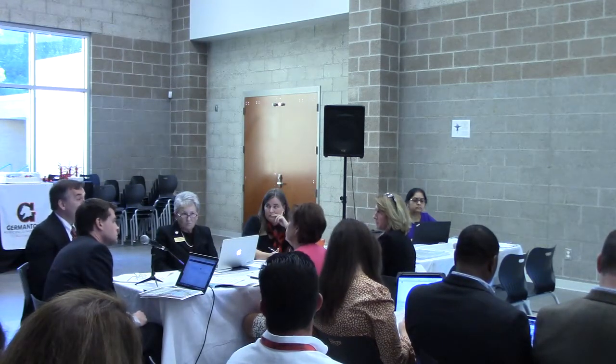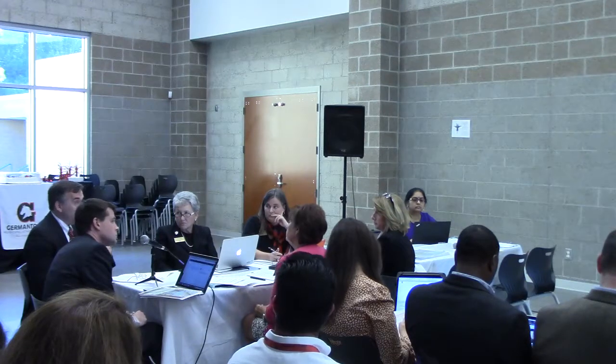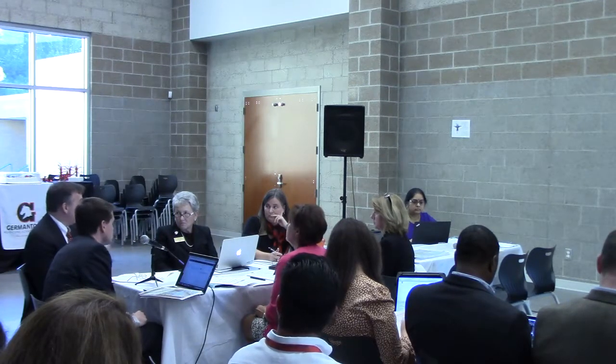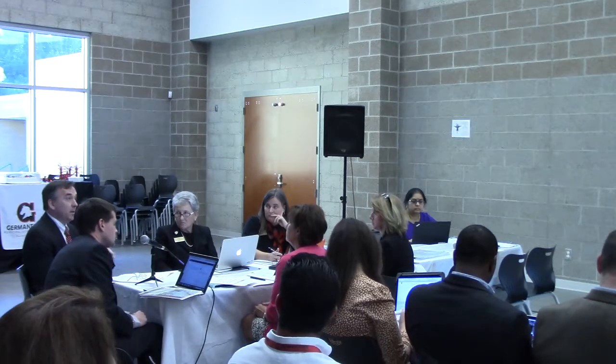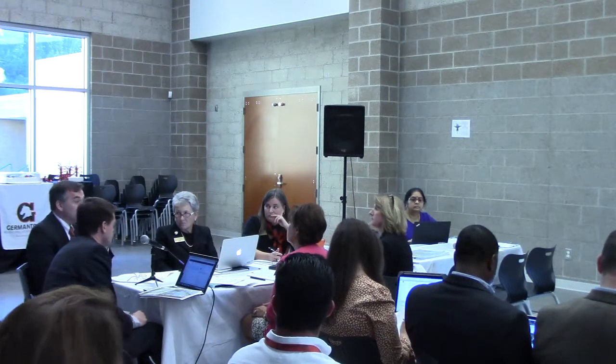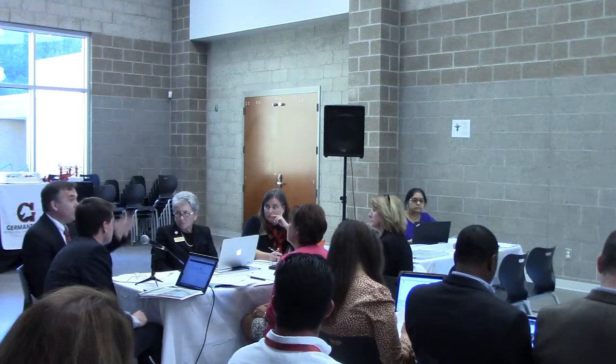So for the first step, we are liable. If they don't raise any money, we are exposed for $22,000. Now, Fleming's willing to work with them, and they have arrangements for this, but that's what we're exposed to right now. For the next step, we would come before the board to say we're ready to move on to stage two and start the next step, which is what you just saw with the new elementary school.